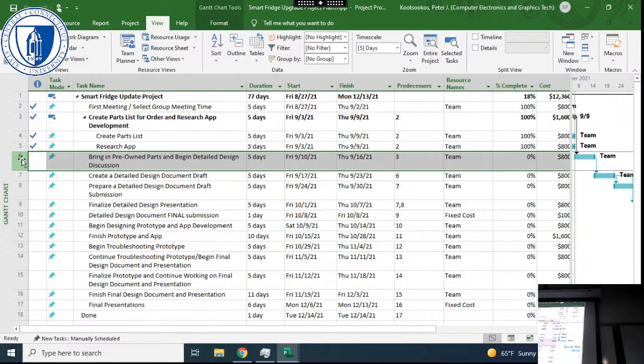I know it's tempting to have as few tasks in the list as possible. The problem with that is the chunkier you make your plan, the worse its accuracy is as far as finishing is concerned.